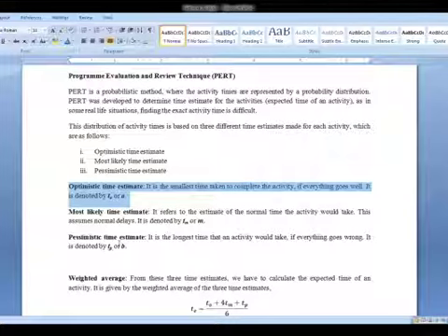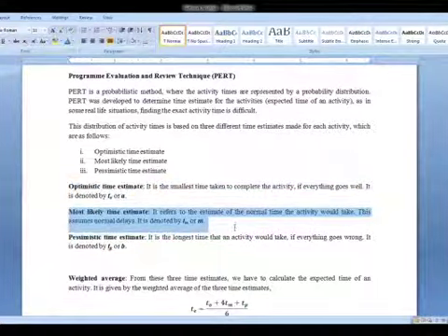What is most likely? Most likely is normally there will be some delays. So on an average, it might take 15 days, 5 days more than optimistic, maybe average time. Usually based on the experience, you'll say that okay, even if everything goes right, there will be some delays. Like sometimes laborers don't turn up, or sometimes some things happen. So 15 days. They are 10 and 15. Now this is denoted by Tm or M. This is denoted by T0 or A.